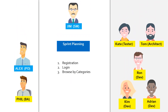Now let's come back to Sprint Planning. The purpose of Sprint Planning is to craft the Sprint goal and draft a plan to achieve it. Attendees are the Product Owner, the Scrum Team, and the Scrum Master. This event would be set up by the Scrum Master. The input for this event is the refined stories of the product backlog. The stories refined in Sprint Zero would be picked up for the planning. Alex provides the business context and Phil walks through the details in the user story and requests the Scrum team to provide estimated story points for completion.